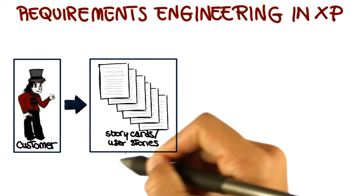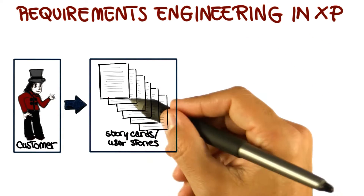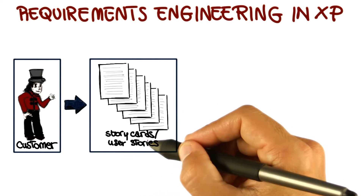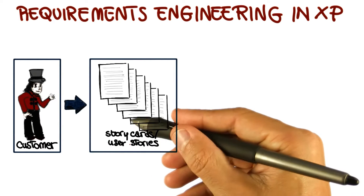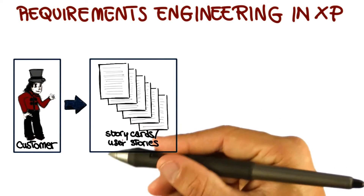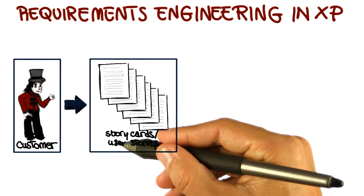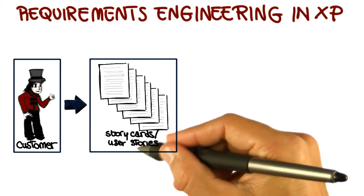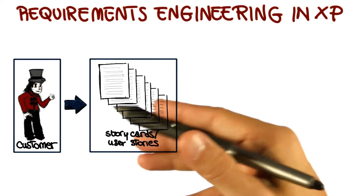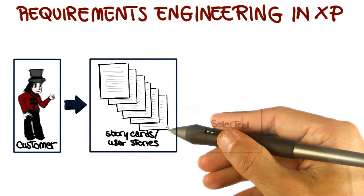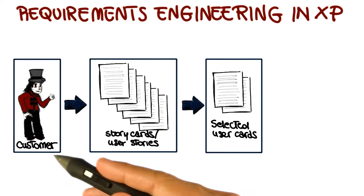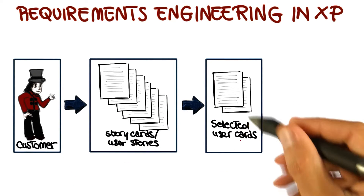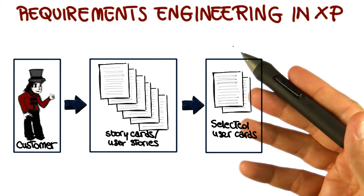These are written by customers on cards. What the development team does is take these user stories and break them down into implementation tasks. Those implementation tasks are then used as a basis for schedule and cost estimates. Given these estimates, and based on their priorities, the customer will choose the stories that will be included in the next release, in the next iteration.